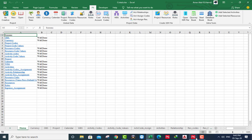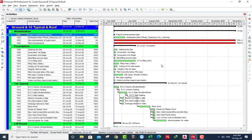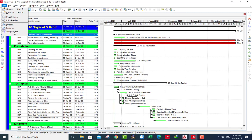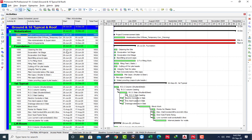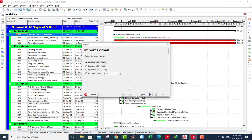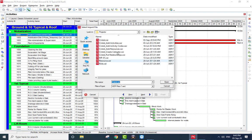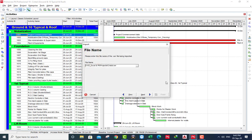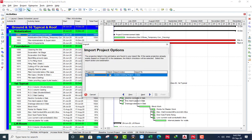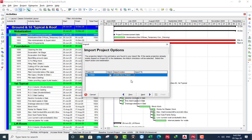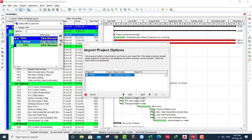Open Primavera. File, Import, Next. Project. This is Crystal, created just now. Next. I will use create a new project. Finish.